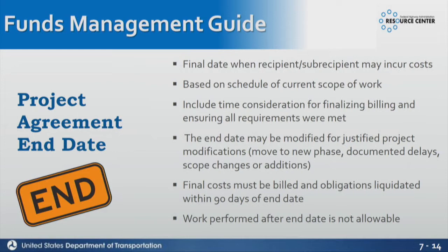That's a big deal. That's why it's really important to monitor that end date and make sure that you're asking for an extension before that end date's actually hit. Otherwise, you could be stuck having to pay for stuff out of your state funds. And there's no leeway in that. The lawyer said, sorry, we cannot allow any costs incurred after the end date and before an extension request is approved to be billed. They're all unallowable costs.